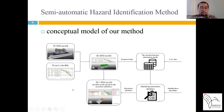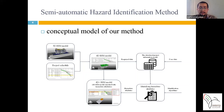Here you can see our conceptual model of the method. The 3D BIM model of the project and the schedule of activities are input to the method. A 4D BIM model is then made by connecting the 3D BIM model with the activity schedule. For safety analysis, further assumptions and details are also needed, such as safe distances from material transport routes or other variables important to the identification process. The user enters this additional information into a separate database created based on data extracted from the 4D BIM model.